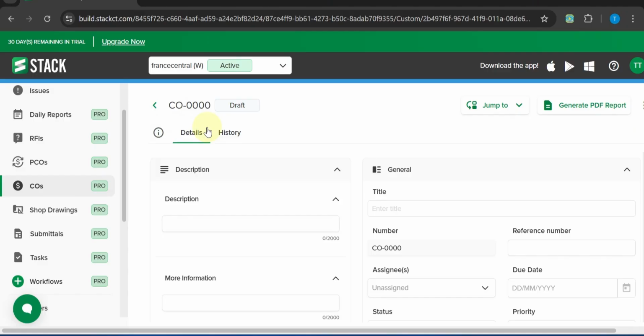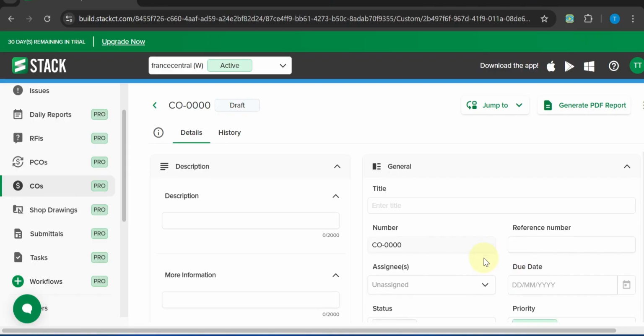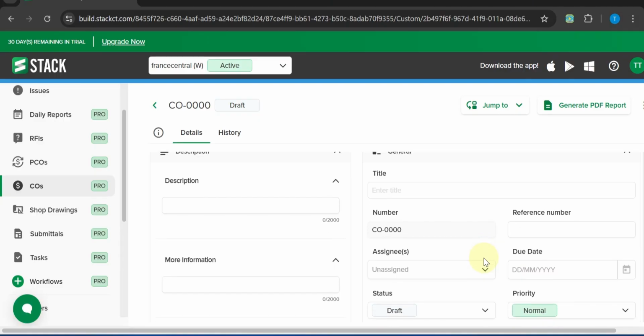The most important thing is consistency. Agree on a numbering and naming system that works for estimators, project managers, and accounting. Consistent cost codes make filtering, sorting, and reporting much easier. They also reduce the chance of duplicates or unclear entries later.